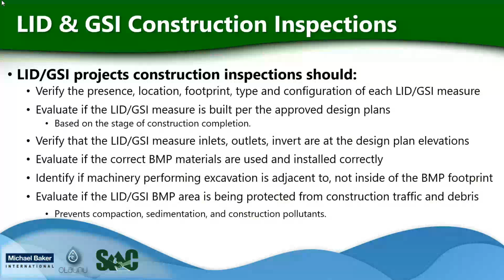Evaluate if the LID and GSI BMP is being protected from construction traffic and debris. This prevents compaction, sedimentation, and construction pollutants.